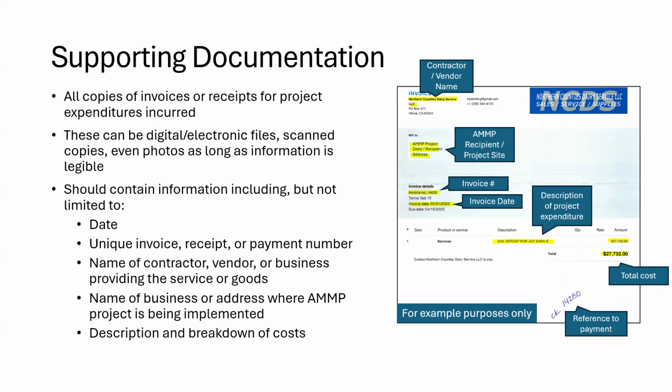Essentially, to approve reimbursement, CDFA needs to determine that the expenditures included are reasonable, allowable, and align with what is described in the approved scope of work and budget. Generally, if the invoice from a contractor or vendor has more detailed itemization and breakdown, rather than a lump sum progress payment, it will make your task of requesting reimbursement easier, can help the processing and approval of your invoice go faster, and also helps the program be accountable for the funds it is distributing.